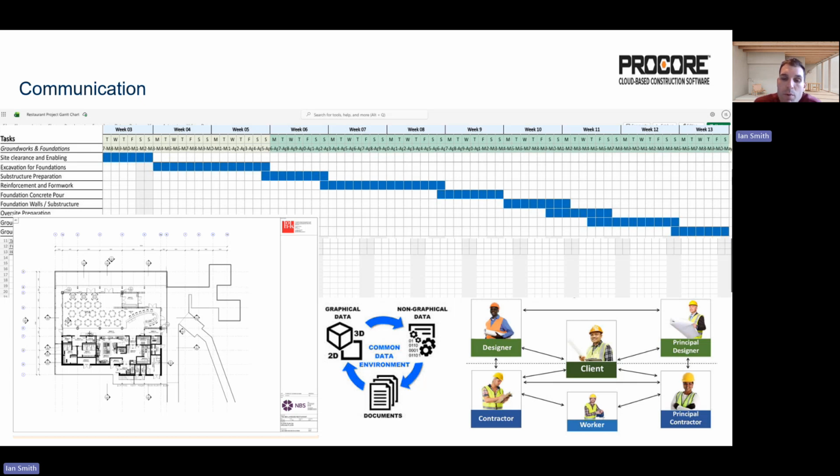The key stakeholders that we have touched on already include the client or developer. These need regular updates from me regarding project progress. The principal contractor and site management team require detailed information about the daily operations of the project, including labour allocation, plant usage and material deliveries. The design team, such as their architects and structural engineers, need to be informed about any technical issues that arise during the construction, such as unexpected ground conditions or design conflicts.